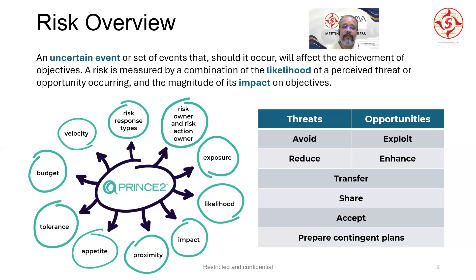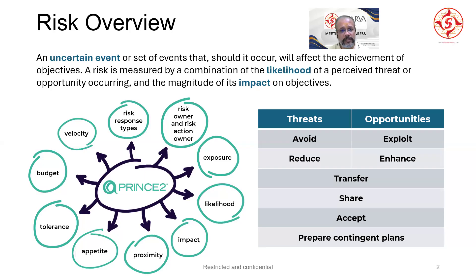The next factor is velocity: the speed at which the risk is nearing on my proximity scale. Then we have risk response types, which I'll detail in a moment. I also need to identify the risk owner and the risk action — who will be taking action if and when the risk occurs. As we saw in the definition, risk can be positive or negative: the positive risk is called an opportunity, the negative risk is called a threat.